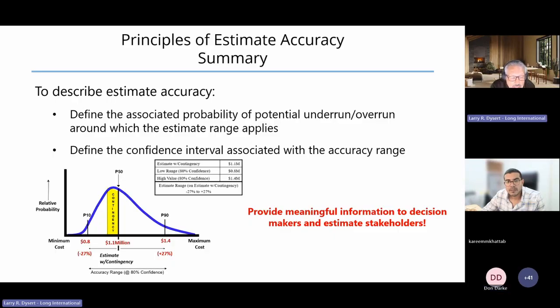Yeah, again, the only way we change the blue curve is by doing better project definition. If we need to reduce the level of contingency or risk funds in early phases, then we need to use some kind of Pareto analysis so you understand, is it site conditions, or is it the cost?